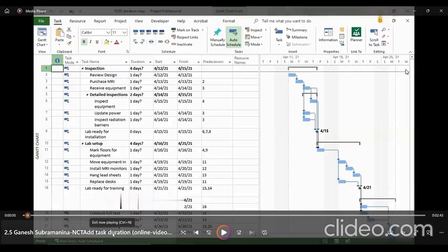Part of building our project schedule is telling the project how long we expect a task to take. This is planned duration. When we create a task, the initial duration value is 1 day with a question mark. We already learned it: 1 day question mark if we haven't specified anything by default. The question mark shows that we have not filled in our values yet. Hence, let us start adding in some durations.